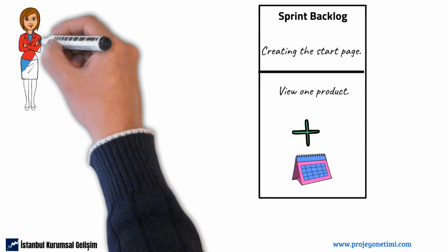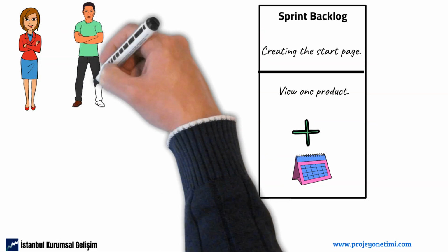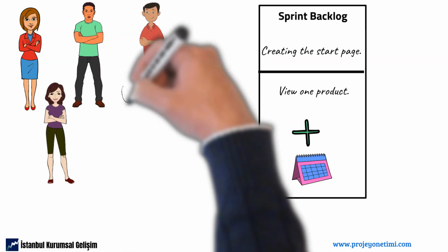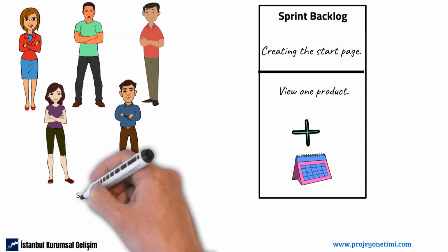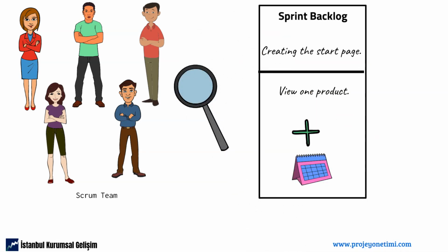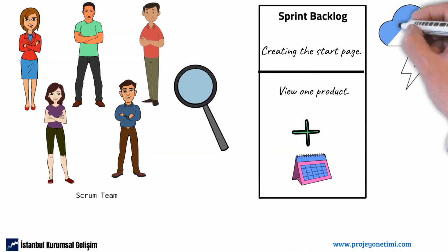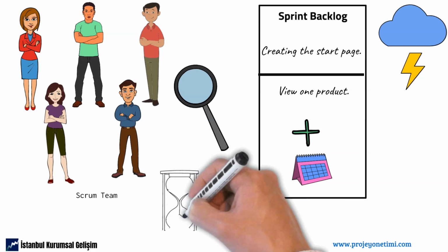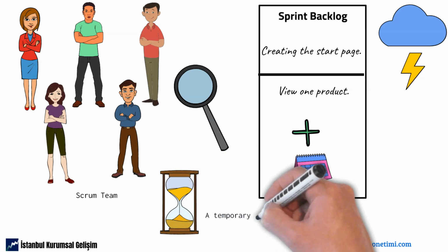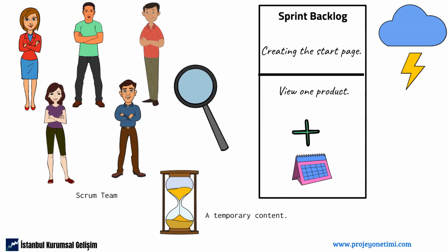When the Scrum team selected product backlog items for a sprint, they created an estimate of what would be delivered. Estimates for the sprint are never a guarantee, promise, or commitment. Unexpected things can happen during the sprint. You can view the sprint backlog as a temporary build that only exists during the sprint. Each sprint will have a new sprint backlog.